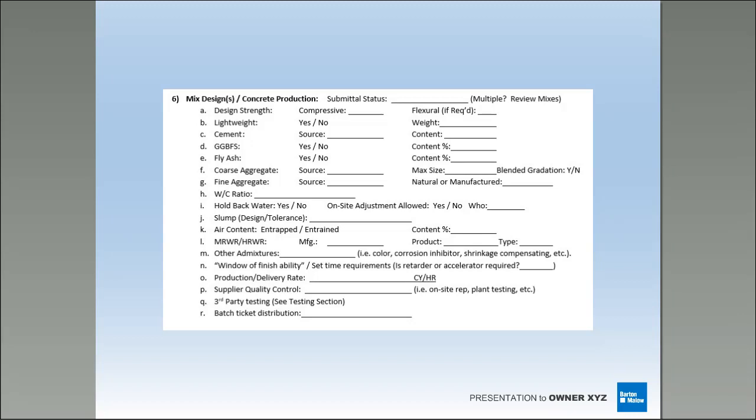We typically log our mix design tickets on a placement log with our pre-pour card and keep it all on file, and share that with either our polisher or our owner if they ask for it. We have copies of it.